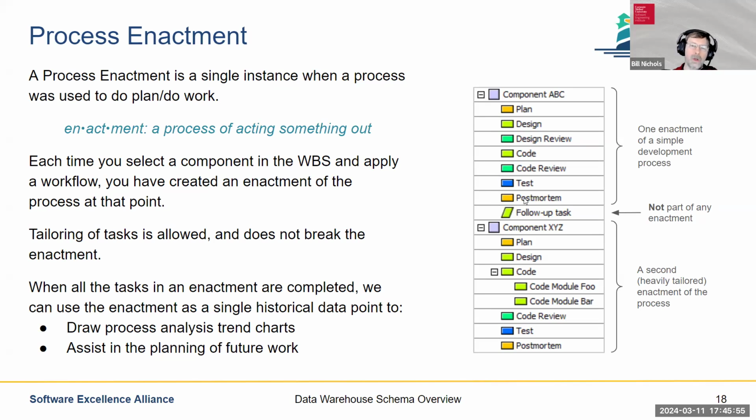If we want to talk to the Agile folks, the process enactment is not all that different from what they would conventionally do in a story that has swim lanes. And the phrase that I've seen some of the coaches in our community use is to reach out to the Agilists and say that this is the definition of done. So these are the pieces of our definition of done. We've got to have all these pieces checked off before we consider that this component is done. Indeed, and many of them do have tasks as they complete through, and they may or may not show up explicitly on their swim lane.